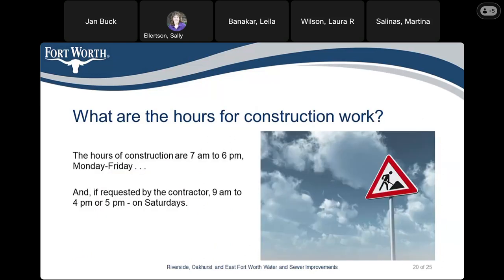What are the hours for construction work? The hours for construction are 7 a.m. to 6 p.m., Monday through Friday. If requested by the contractor, they can also work 9 a.m. to 4 or 5 p.m. on Saturday.